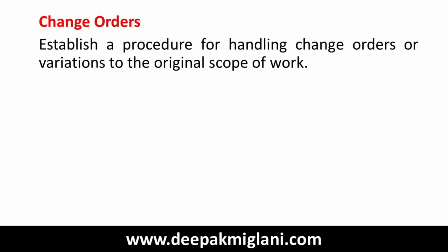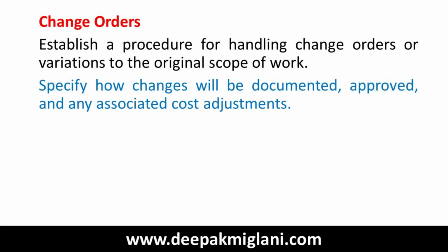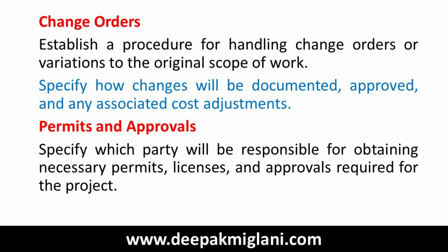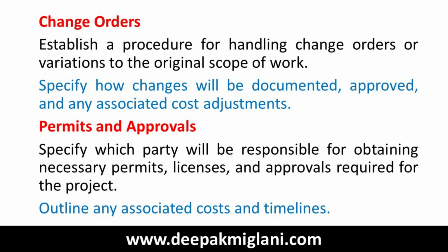Change orders. Establish a procedure for handling change orders or variations to the original scope of work. Specify how changes will be documented, approved, and any associated cost adjustments. Permits and approvals. Specify which party will be responsible for obtaining necessary permits, licenses, and approvals required for the project. Outline any associated costs and timelines.